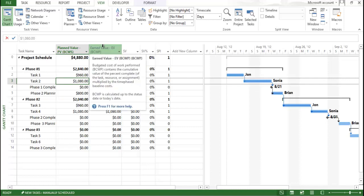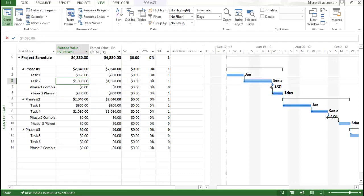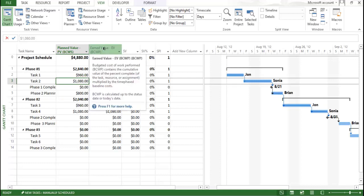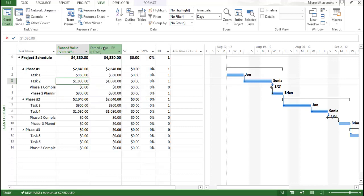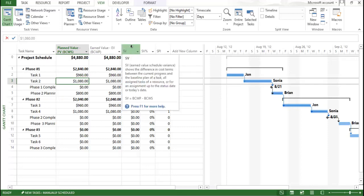Earned value is the Budgeted Cost of Work Performed — it contains the cumulative value of the percent complete, which includes task, resource, and assignment. BCWP is calculated by multiplying the percent complete by the baseline cost, based on the status date or today's date. Whatever work is performed up to the status date — that cost, weighted by percentage complete, is called the earned value. Schedule Variance is calculated as Earned Value minus Planned Value, which identifies the schedule variance.